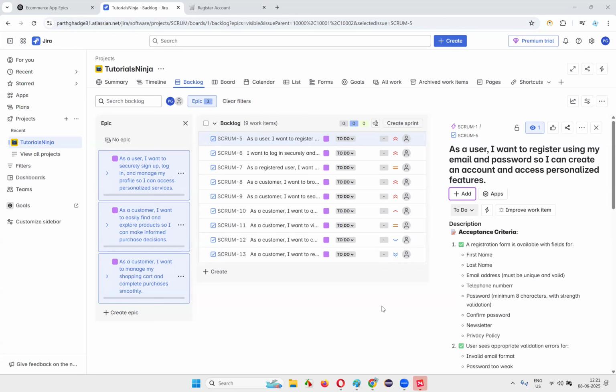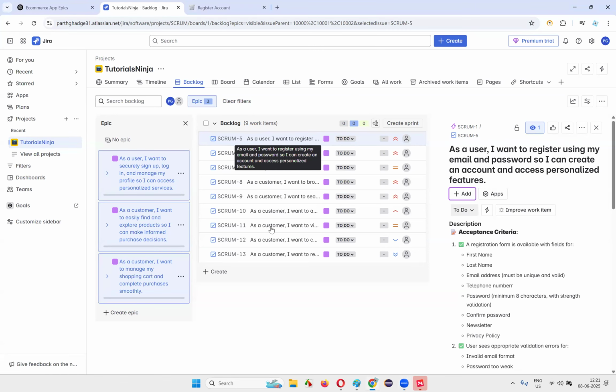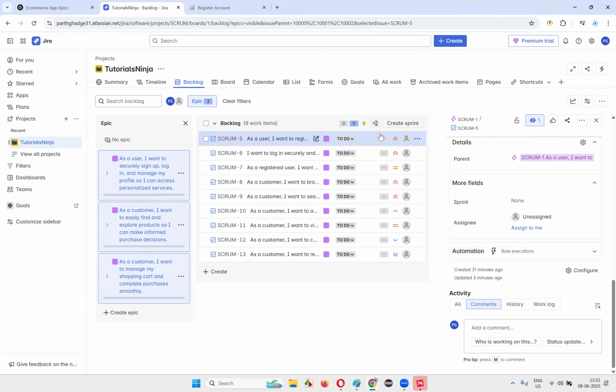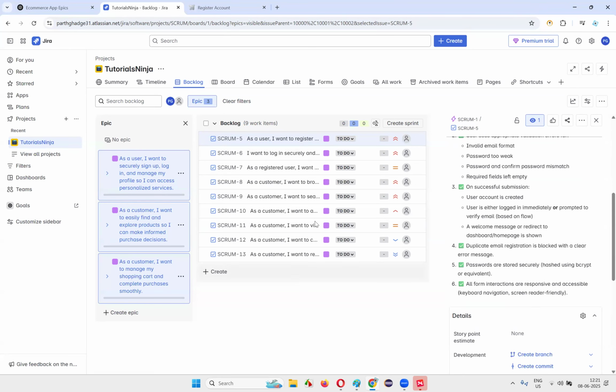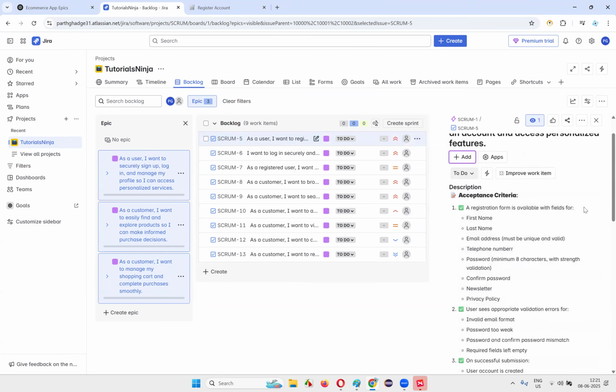Kickoff meeting is not the right one and stand-up call is not the right one. Sprint planning meeting is the correct one. Whatever Priyanka has said is correct. Okay, sprint planning meeting will be there. The sprint planning meeting is conducted between the product owner and the team who is going to work on that. Before that only, the product owner will decide the priorities of the user stories, and also do one more thing.